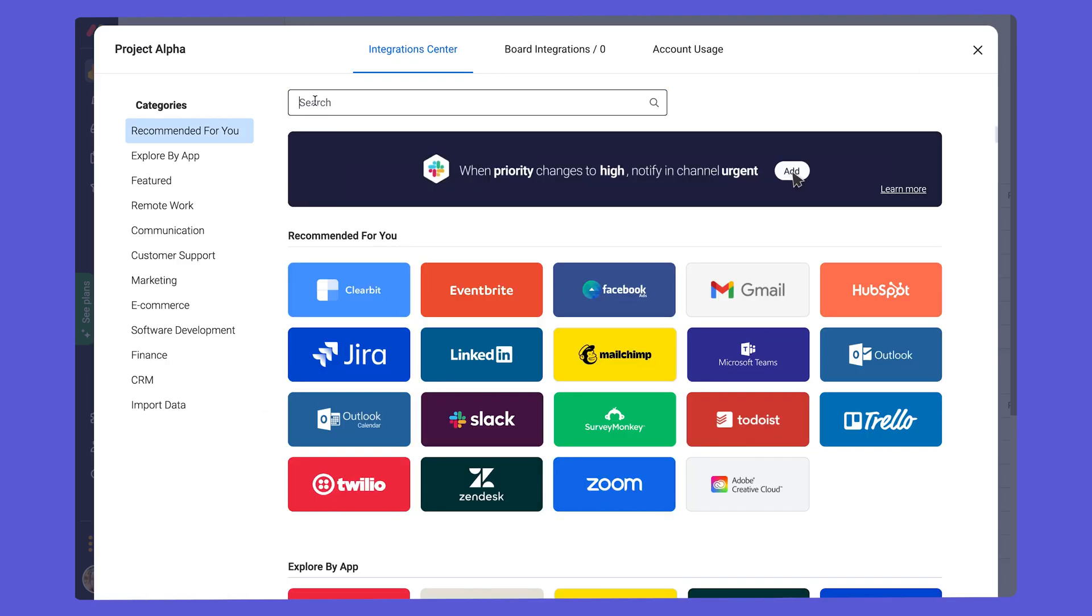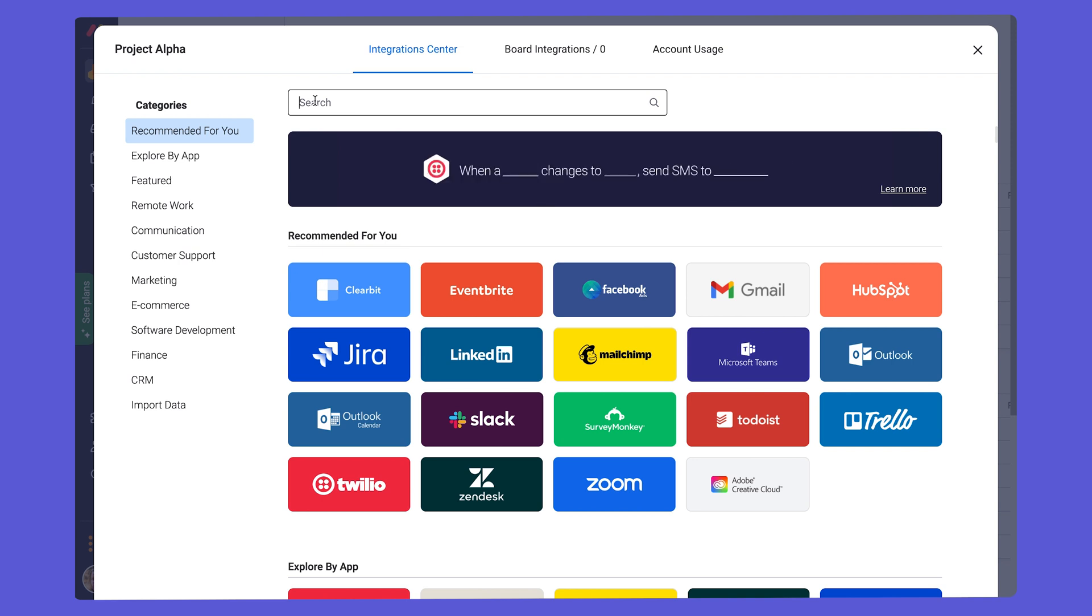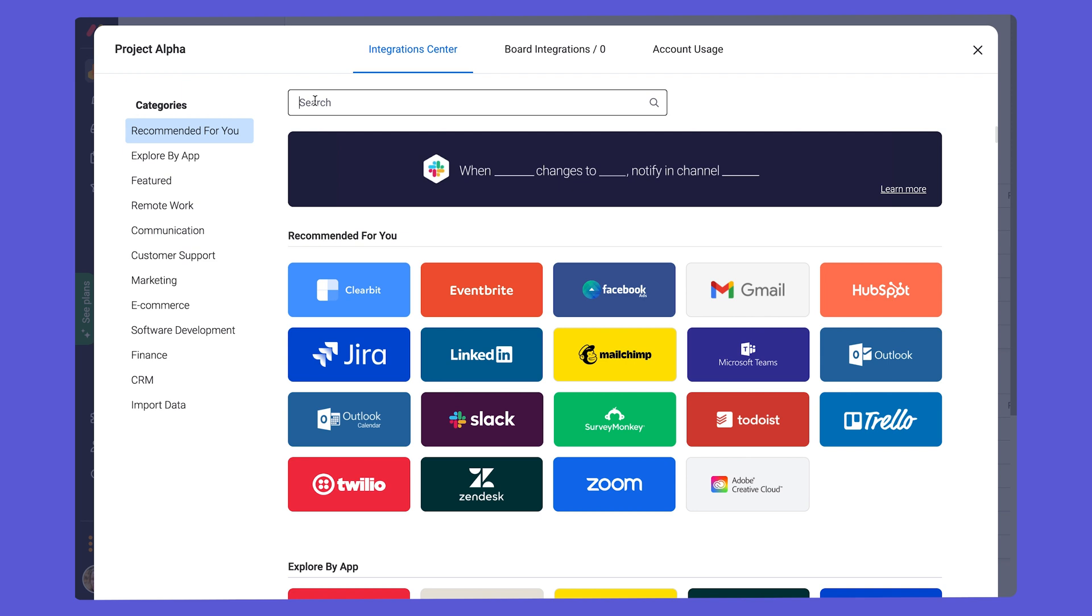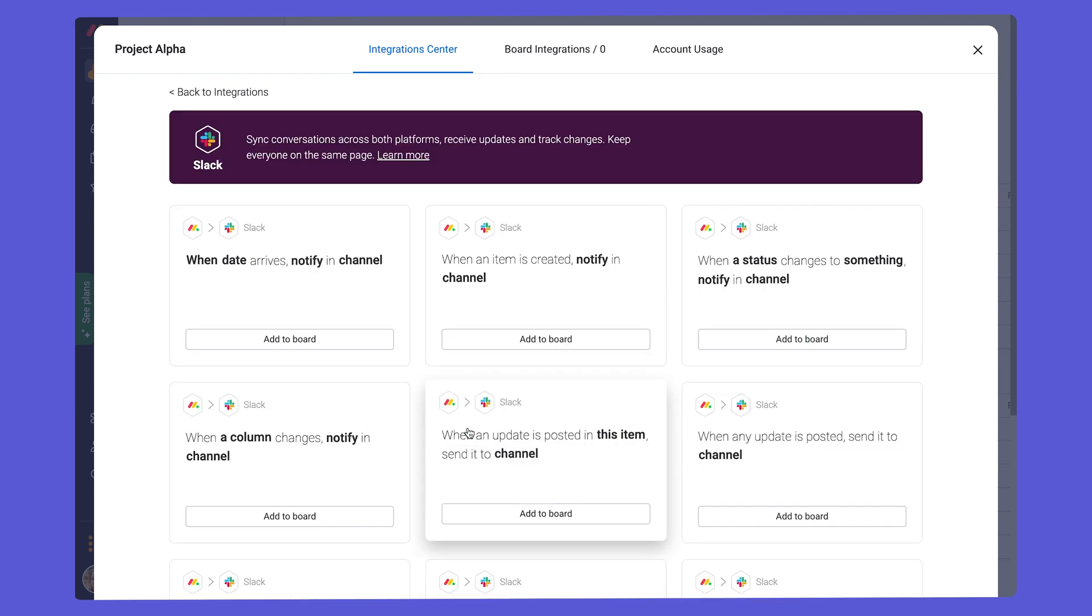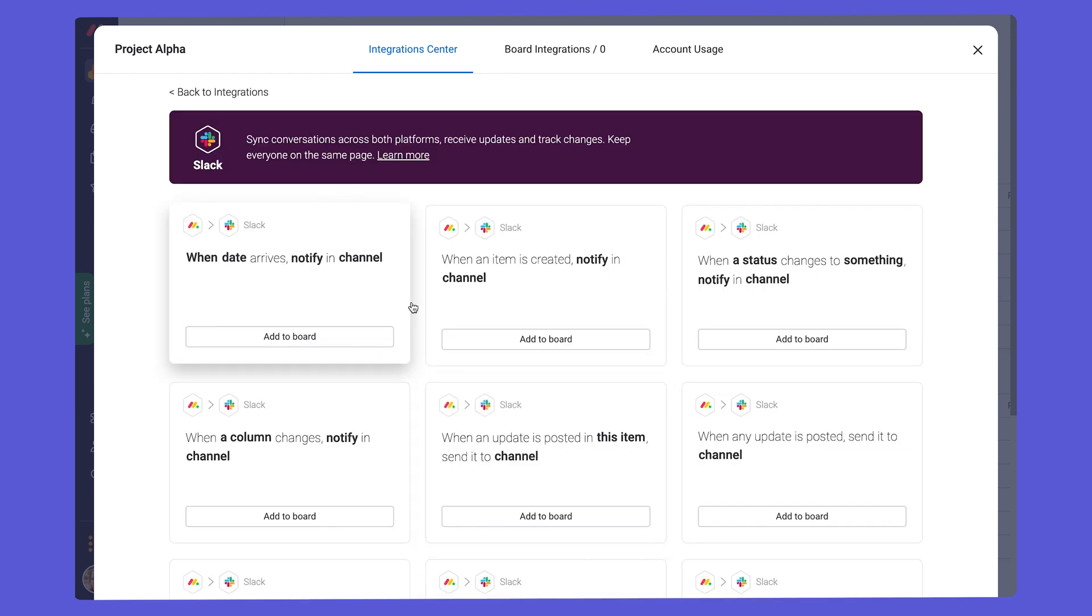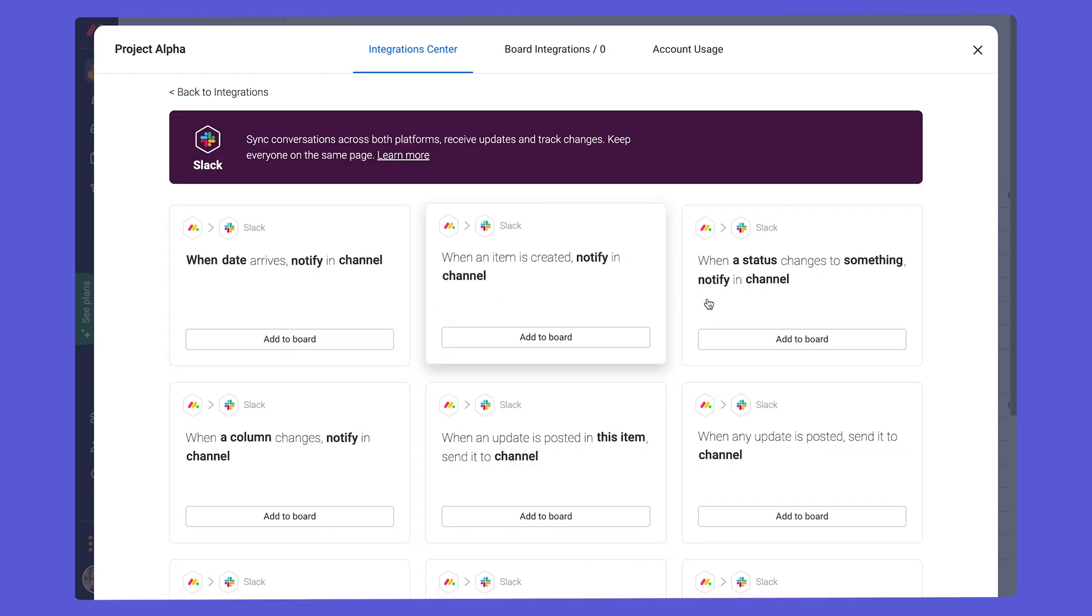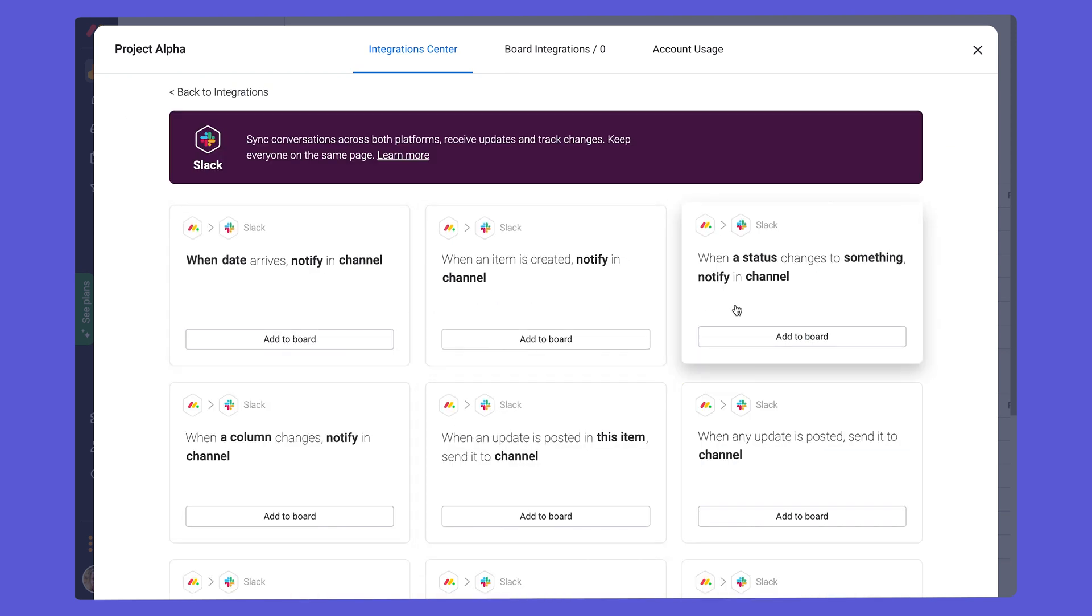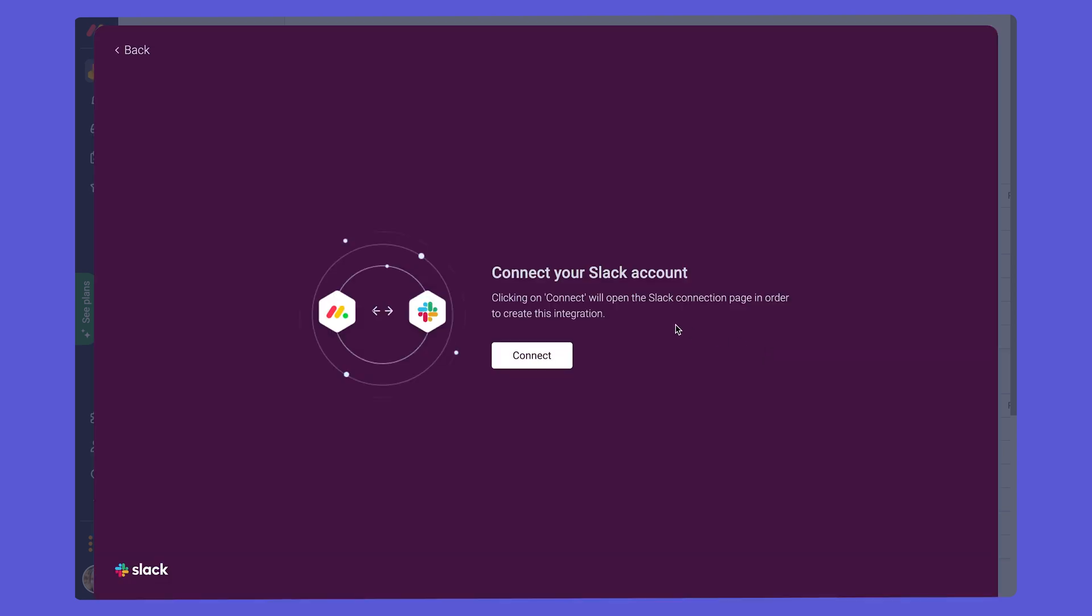If your team communicates internally via Slack, we also suggest checking out our Slack integration. Using this to ensure that changes on your board, updates, and upcoming deadlines are communicated swiftly to the team in the appropriate Slack channels. Come down here in the integration center to Slack, and we can choose whatever integration we'd like that will come up in our channel and connect our Slack account.